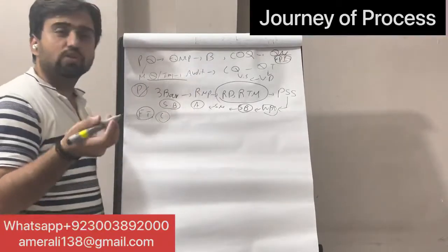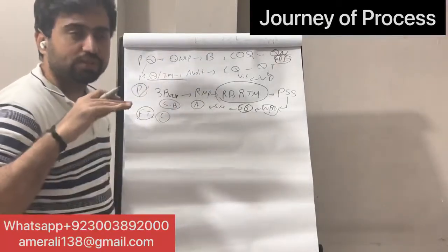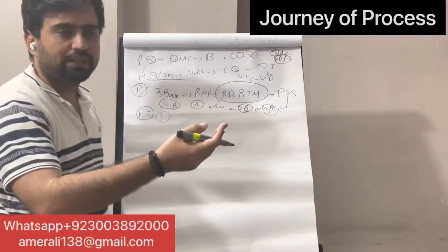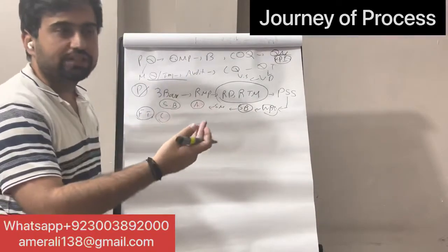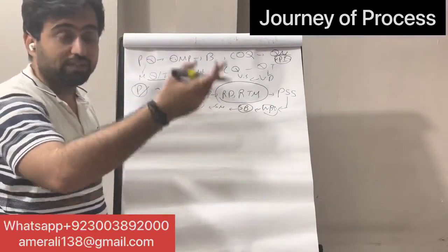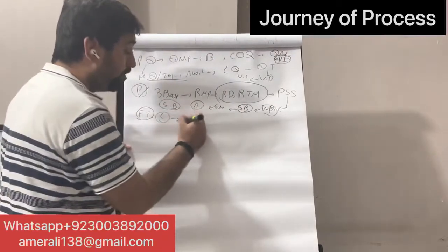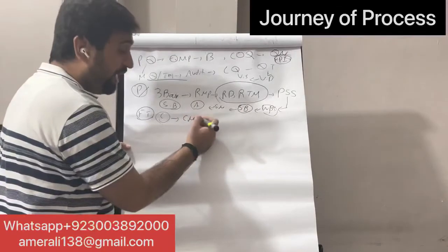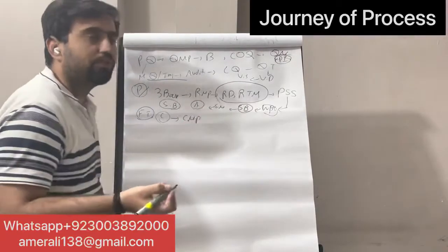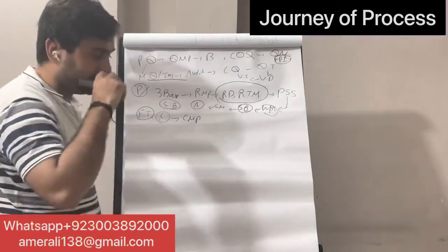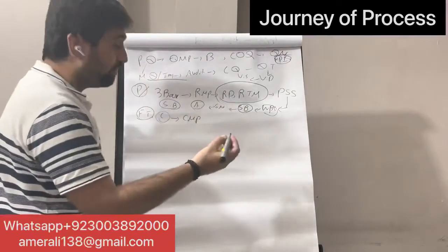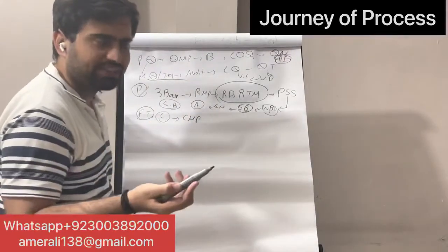We also have a resource optimization technique, resource leveling, in which all resources are optimized, but the schedule gets increased. If we don't want to increase the schedule, we do resource smoothing. Once that is done, then you make the cost management plan. The cost management plan tells which type of currency to use and how to use that currency. So you use the cost management plan to see how you are going to finance the project.